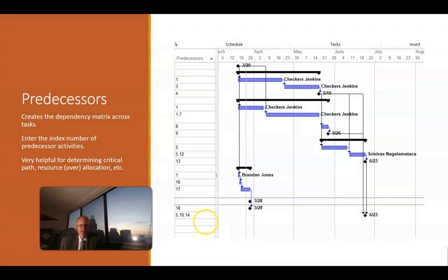Another big thing we can look at, which is important if you're a project manager, are any constrained resources. So if we have a subject matter expert and this person is the only person in our company who knows how to answer this question or do this task, let's put out a chart like this and make sure that person is available when needed, because odds are that person might be pulled into other projects. Maybe it's a principal engineer on our team or somebody who knows cybersecurity really well or one of those specialized skills. And we want to make sure that that person's available and not pulled into another project. If not, the risk is that that one person could put our project at risk.